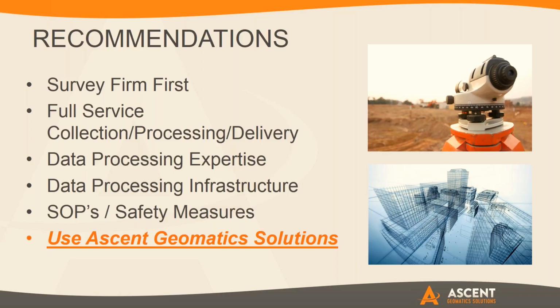Yep, exactly. And then full service collection, processing, and delivery. So this is another issue that we've seen sometimes, where a firm is contracted, but they'll use their UAV or their drone to collect some of the data on the front end, but don't have the infrastructure or the expertise internal to be able to actually process all that data. So that gets shipped somewhere else. And ultimately, maybe there's a survey firm that's brought in to help set ground control. And before you know it, you've got 3 or 4 different folks involved. That can just delay the project.